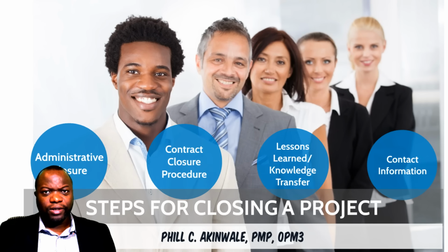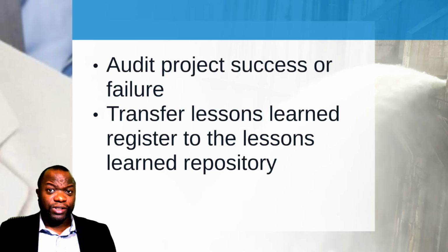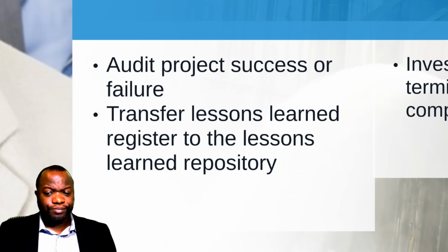Let's talk about the lessons learned pieces that I was referring to a few minutes ago. So you want to audit project success or failure. Did we fail? Did we succeed? How do you know that? Well, you've got your project charter as an input to close project or phase. So that will tell you the success criteria. Now this is quite important. I mentioned this in the beginning, the transfer of the lessons learned register to the lessons learned repository. You want to make sure that's done.